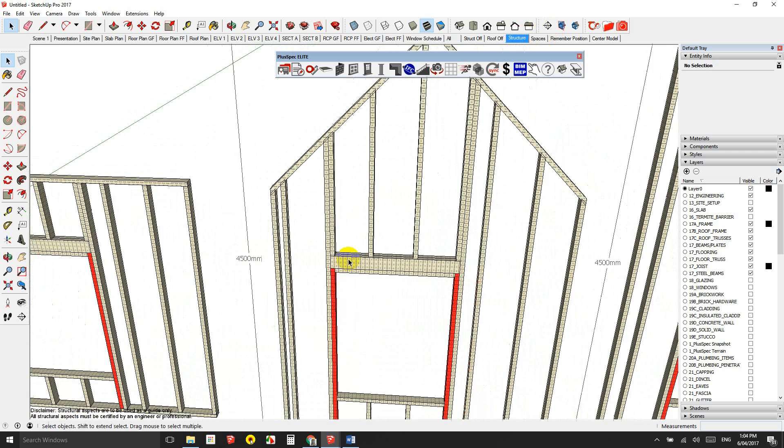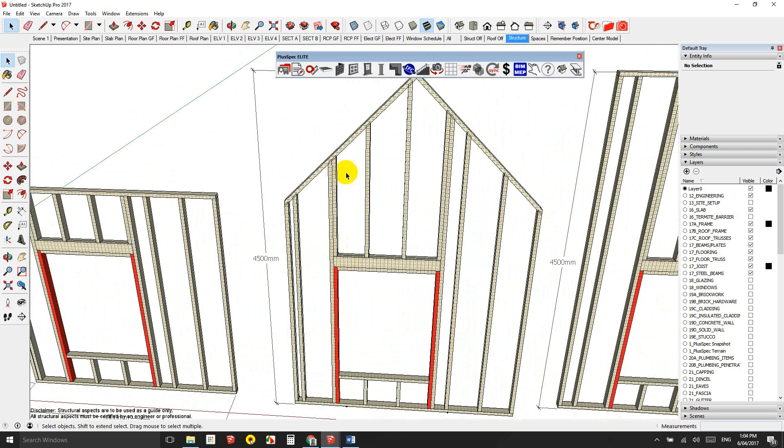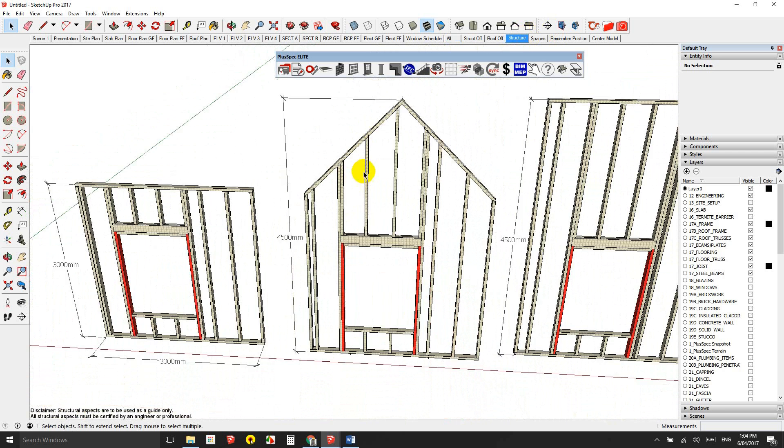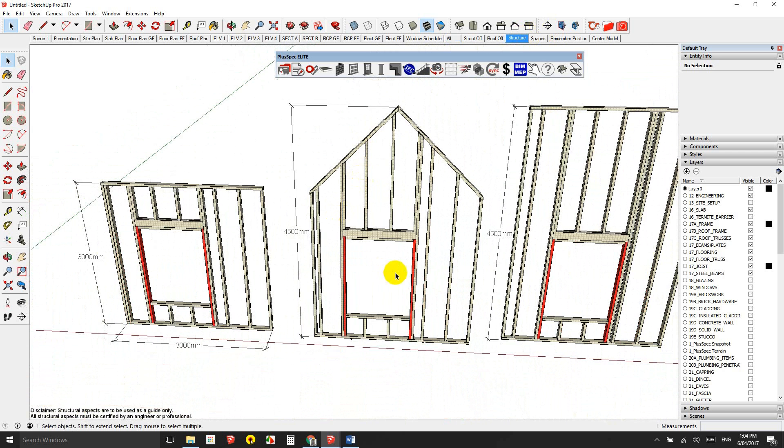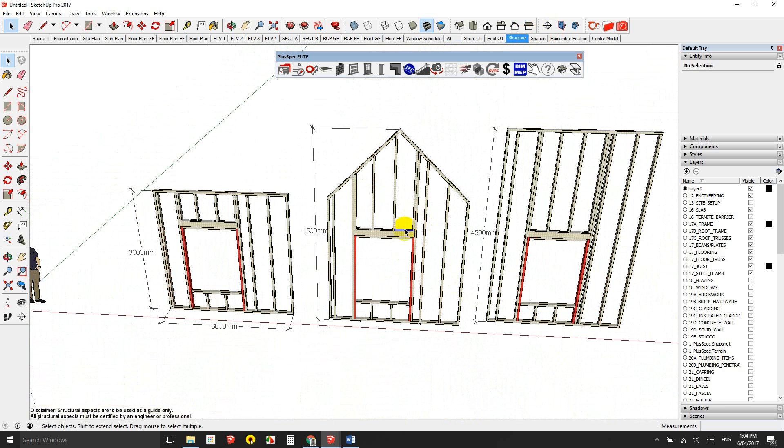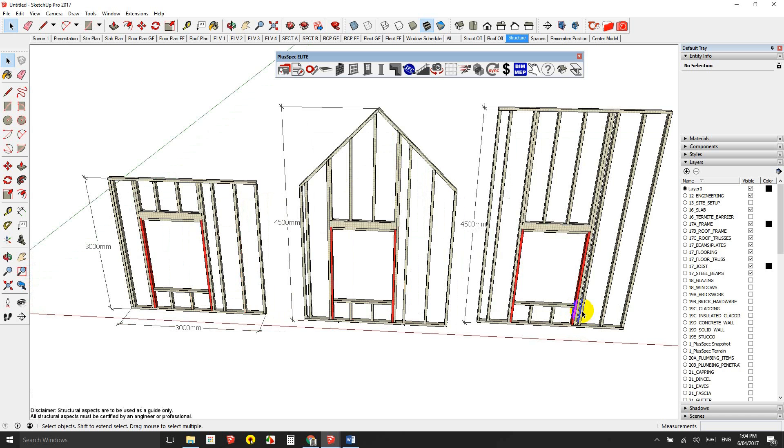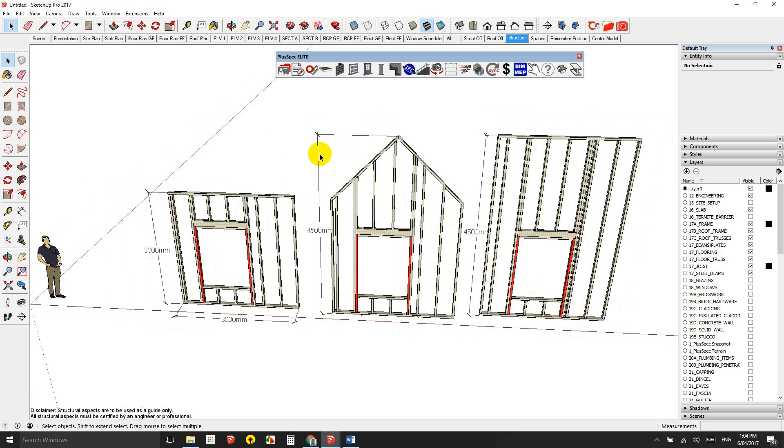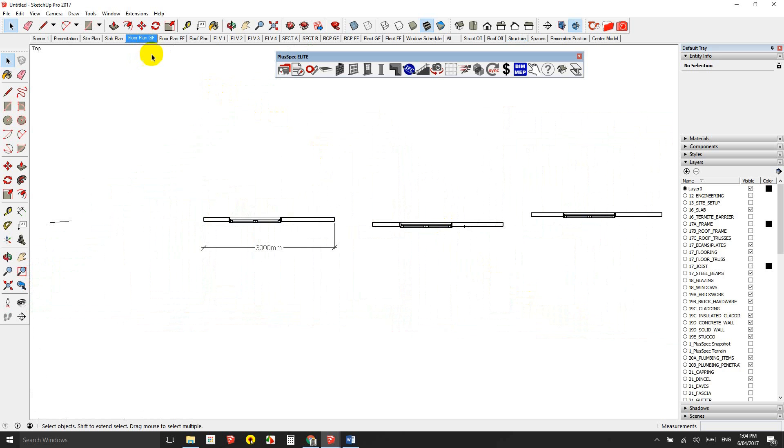So it deducted the amount of cladding in it and deducted the extra studs that are available there. And it did a calculation based on actuals. This one here, it added in the extra studs that were required for the gable. And depending on where these windows are placed, it could be an extra stud or not. And it's something that you really cannot calculate in line drawing software. So let's have a look at what that actually means. Maybe put it back into perspective.